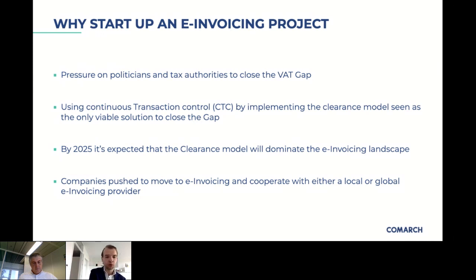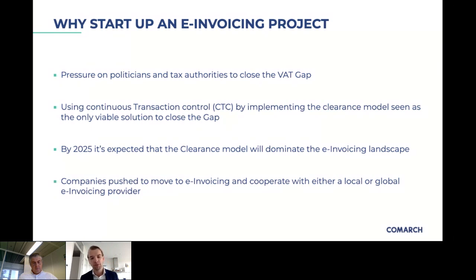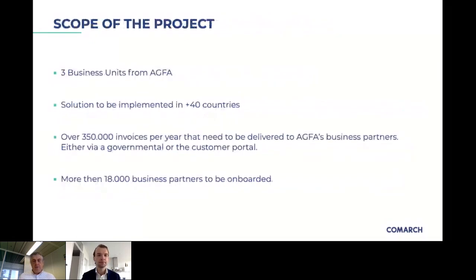Peter, the next question is about the complexity and scope of the project. Can you elaborate on that? Well, in total we're talking about around 100 countries where we are active, across different IT systems. It is impossible to do it all at once. So the first scope — phase one — is Europe as a geography.